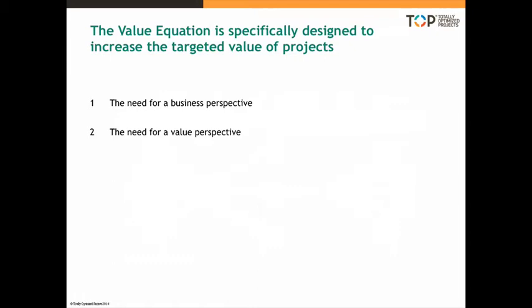Subsequently, you can optimize your project by eliminating high-cost, low-value outcomes, but you are now making these optimization decisions based on the value available, not just on the cost to be justified. So if you do delete aspects of the project, you know what value you are sacrificing as part of that. When you don't do the value equation, you can end up, as one client did, where he deleted one module to save costs, but we then found that 60% of the benefits were delivered by that one module through using the value equation. Obviously, it was reinstated.